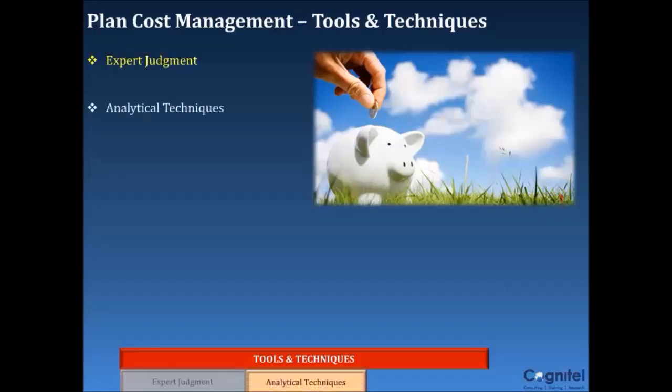Analytical techniques involves choosing the strategic options to fund the project, such as funding with equity, self-funding, or funding with debt. The cost management plan may also detail ways to finance project resources such as making, purchasing, renting, or leasing. These decisions, like other financial decisions, affect the project and may also affect the project schedule and project risks.